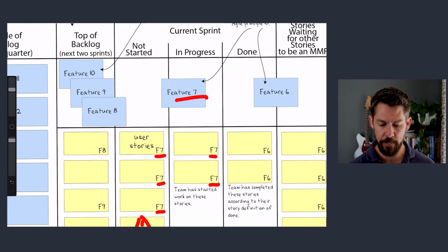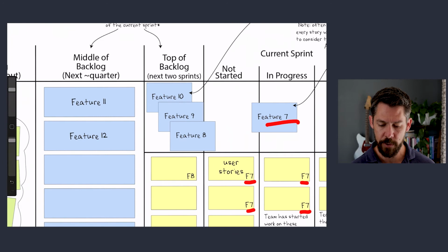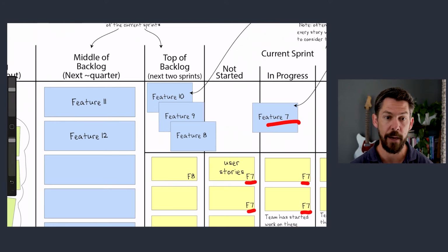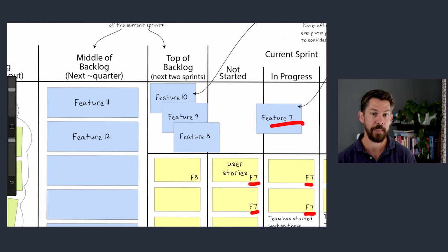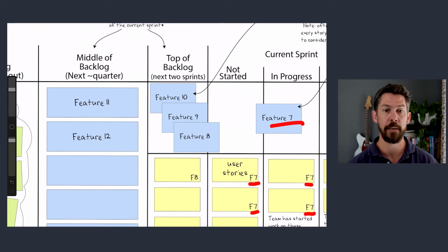Now, moving out to the backlog. What does the product owner do with items at the top of the backlog? Well, a lot of what we think of as typical backlog refinement. Splitting, sizing, elaborating details, maybe getting wireframes on things, thinking about scenarios or tests, acceptance criteria, whatever it is you do in your environment to get a story ready for a sprint.